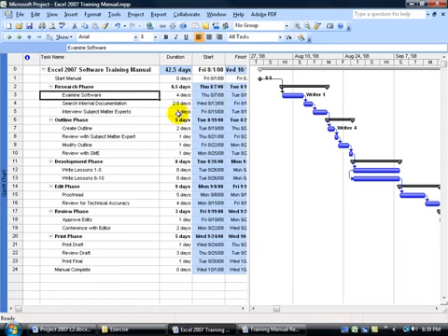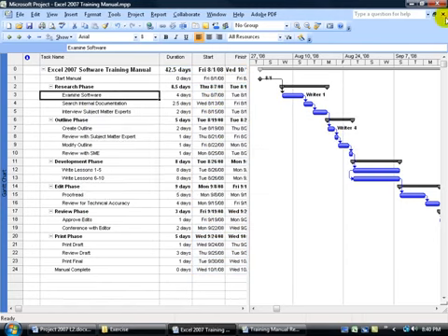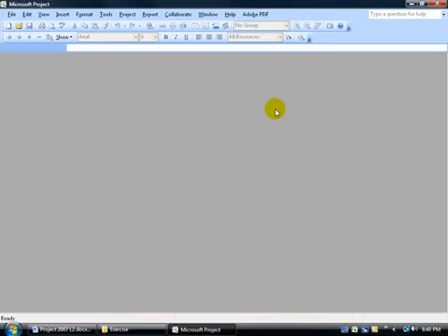I would want to look at the dates closer to find out exactly when that resource in the other project is going to finish, so I can have that same resource over here on my task start just the day after. If we're good with everything, let's click Save. Click OK to update it all. Let's close out of everything.